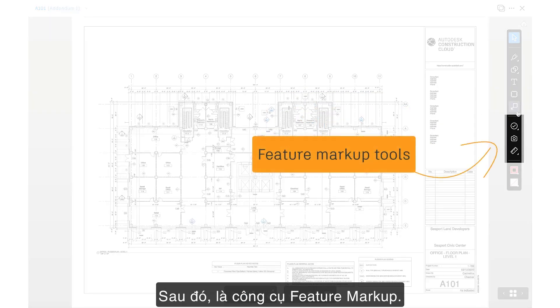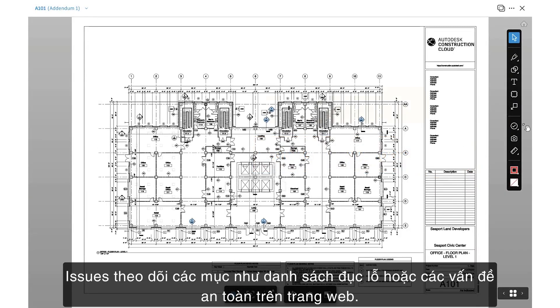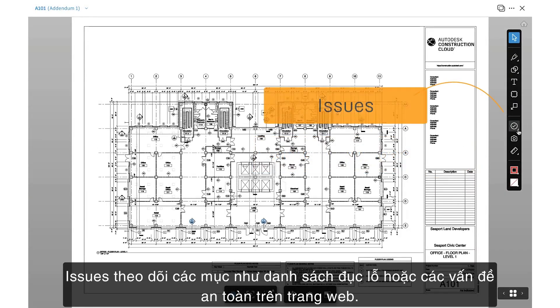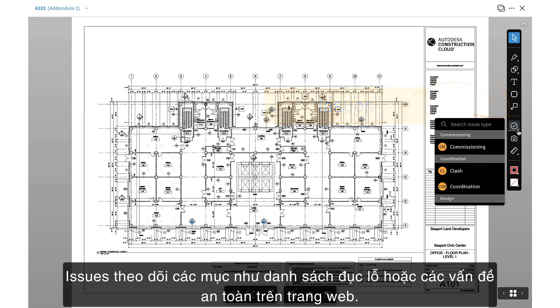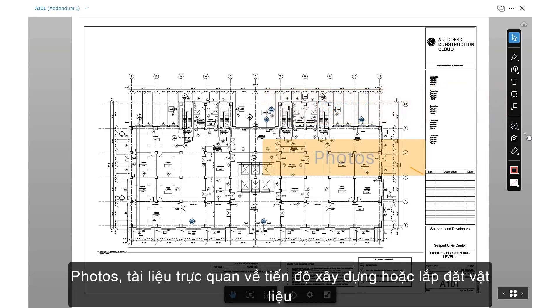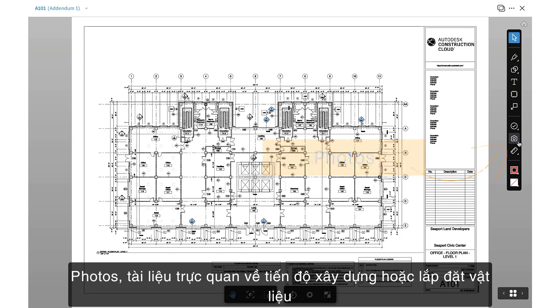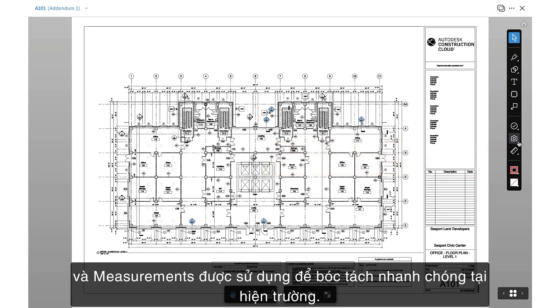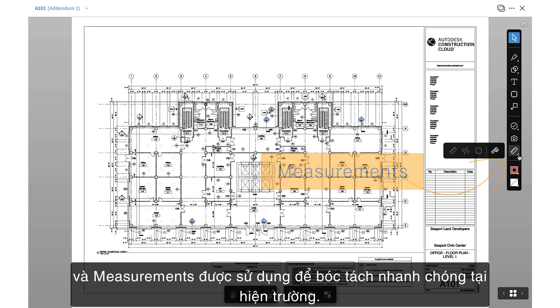Then we have the Feature markup tools. Issues tracks items like punch list or safety issues on site, Photos visually documents construction progress or material installation, and Measurements to be used for quick field takeoffs.